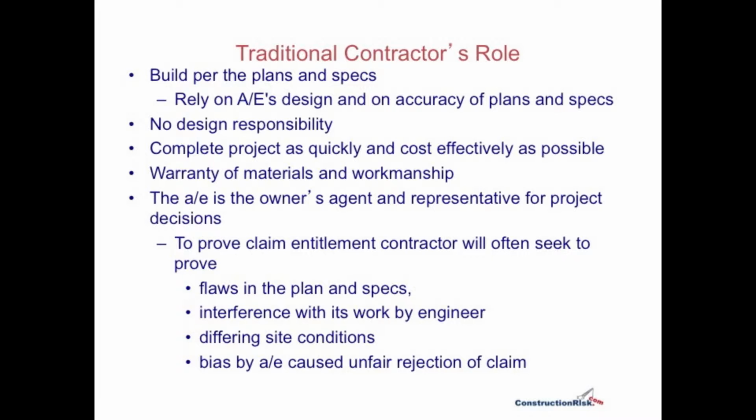And again, those claims typically are going to go against the project owner, and the owner in turn might come back against the designer in either a separate action, or perhaps they'll consolidate these actions into a single setting. The contractor in the traditional role is liable for timely completion. We typically see liquidated damages for delays in meeting the schedule. Liability for materials and workmanship warranties not being met. Responsible for means and methods of the performance.